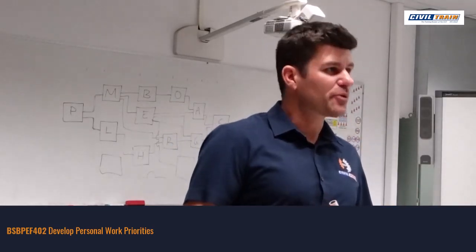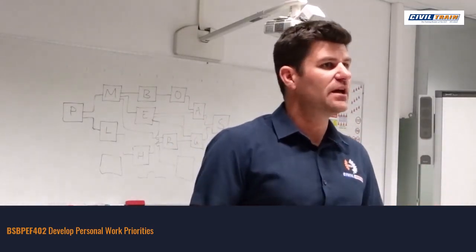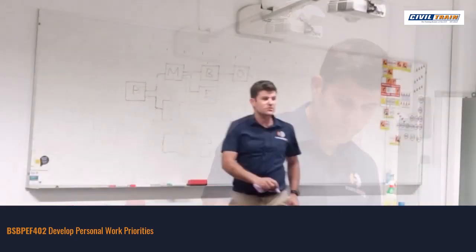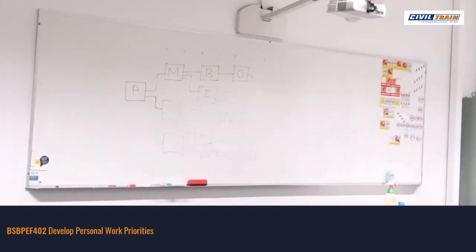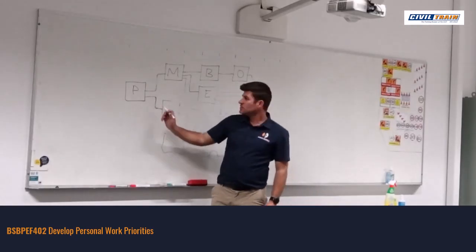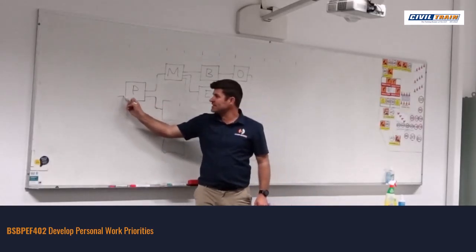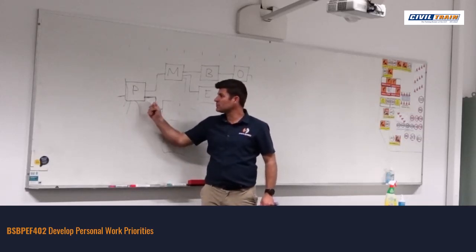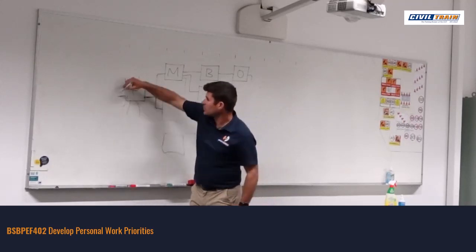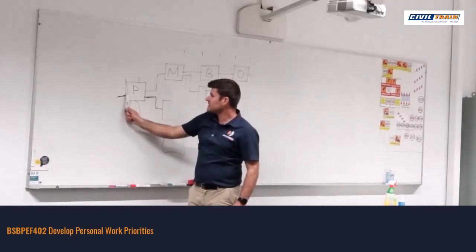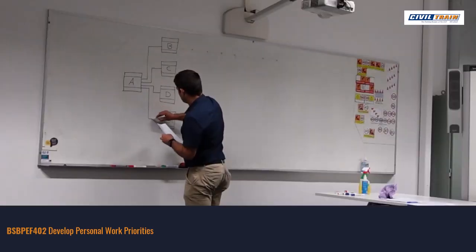So initially, again, have a go at drawing the precedence diagram, which is just a network diagram at this stage, with those dependency lines drawn in. Just to quickly identify as well, gentlemen, when you're drawing your lines from your boxes, always have them going into this end and coming out the other. Don't have them coming out of the middle or the sides. So just always have a clean line coming in and a clean line coming out. So it indicates that's the start and then that's the finish.